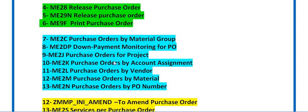ME2J is used for purchase orders related to a project. Sometimes we create capital estimates, create a project, and create WBS elements. For external processing of project services, a purchase requisition is generated and then used for creation of a project-related purchase order. To find purchase orders created for any project, you use transaction code ME2J.